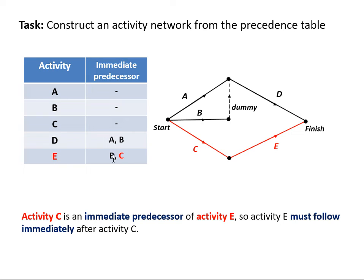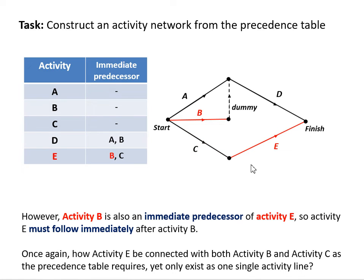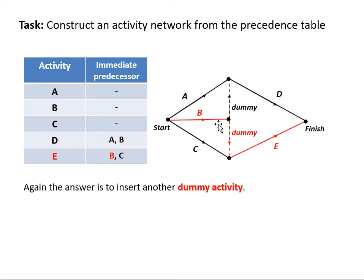Let's continue on. E follows on from activity C. Activity C is completed and E can commence. However again, activity E requires B to be completed as well. So again, we have this problem where at the end of C, activity E is drawn in, but we also need activity E to be joined to B. We can't draw two activity E's. So again, we use a dummy variable at the end of the vertex of activity B. We join it down to the end of the vertex of activity C. Now we can see that B is completed to start E and C is completed to start E. We've upheld the rule of our precedent table.